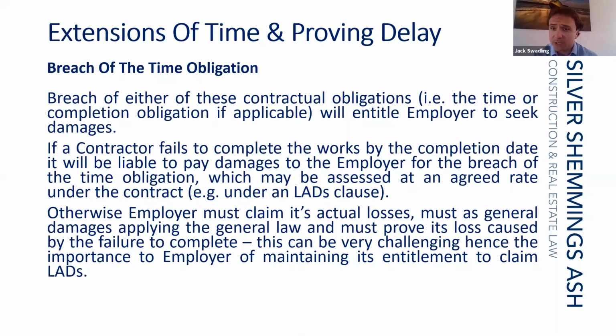And what the liquidated damages provision does is set a fixed tariff of what the employer can claim in the event that the contractor fails to complete by the completion date, i.e. it breaches the time obligation under the contract. Some would say that the liquidated damages clause is actually the most important clause under the contract, so far as the employer would be concerned.